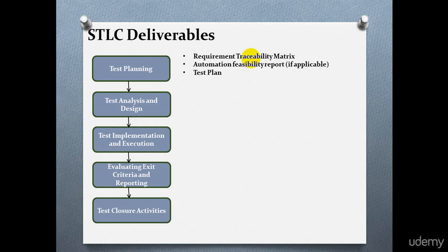During the test planning phase, the test plan is documented. For the testing team, this test plan is very important. Test plan documents the type of testing performed, identifies the environment details, test tool selection, defines the training needs, resource planning, and defines the roles and responsibilities. A test plan helps monitor the progress of various testing activities and helps in taking control in case of any deviations from the planned activities.